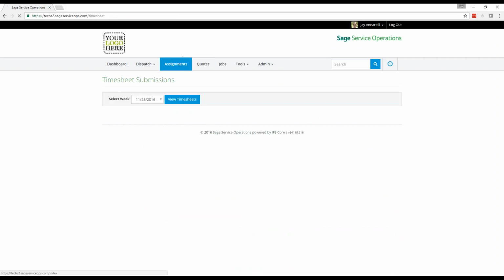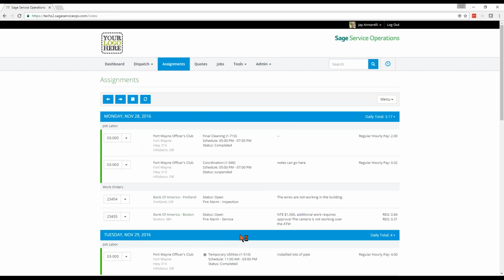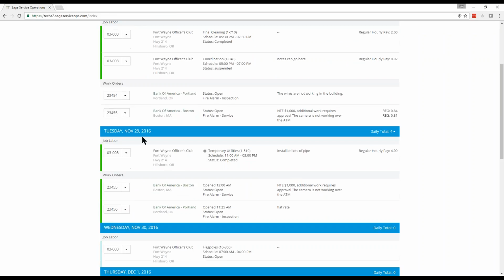Okay. So if I go back to my assignments page, I can see Tuesday, today, I already worked 4 hours on this construction project on temporary utilities for this cost code. And I put a comment in there. I said I installed lots of pipe. But I also have 2 work orders to go to this afternoon. So I have some visibility into that.